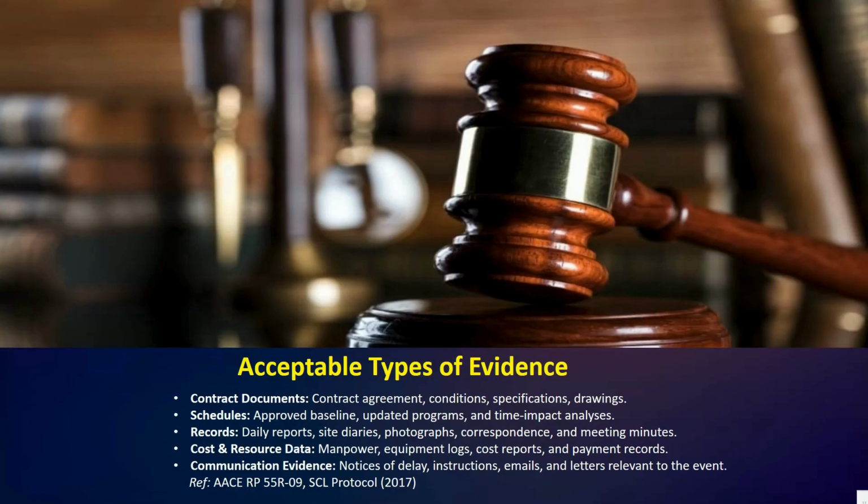Next, we have acceptable types of evidence. First, contract documents. Second, we have schedule, then records, then cost and resource data, then communication evidence.